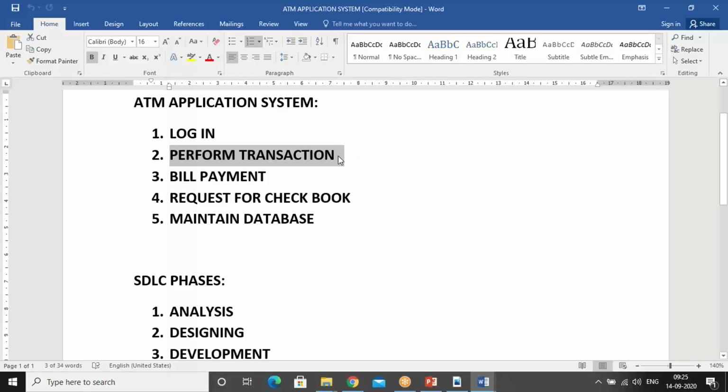Now assume that you complete these 4 items within 8 days, but your sprint time is 10 days. On the 9th day and 10th day, you are not going to do anything. You will sit idle. You are not going to start sprint 3 from the 9th day. You will wait for 2 days, the 9th day and 10th day, because our sprint time is 10 days. After completing sprint 2, you start sprint 3. So this is how the development process goes in Scrum.